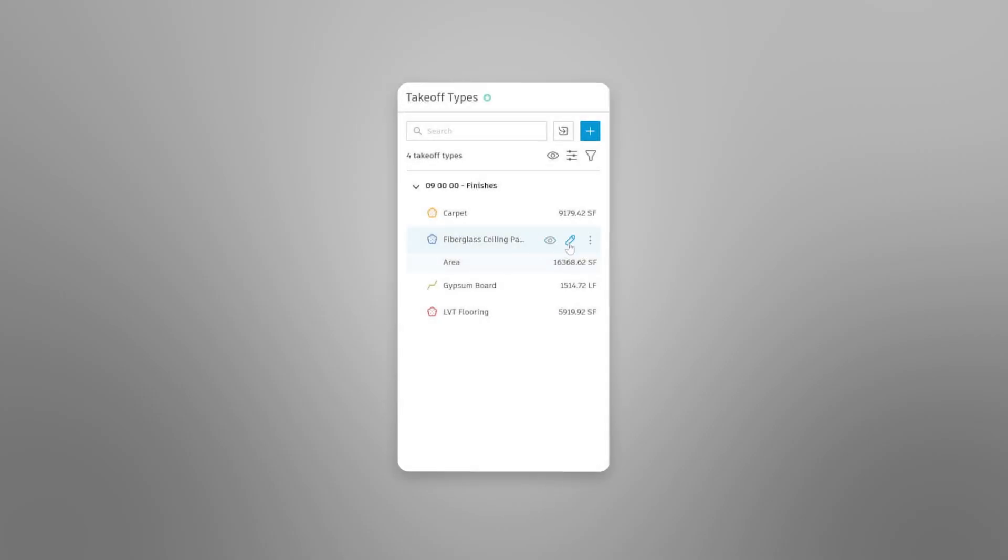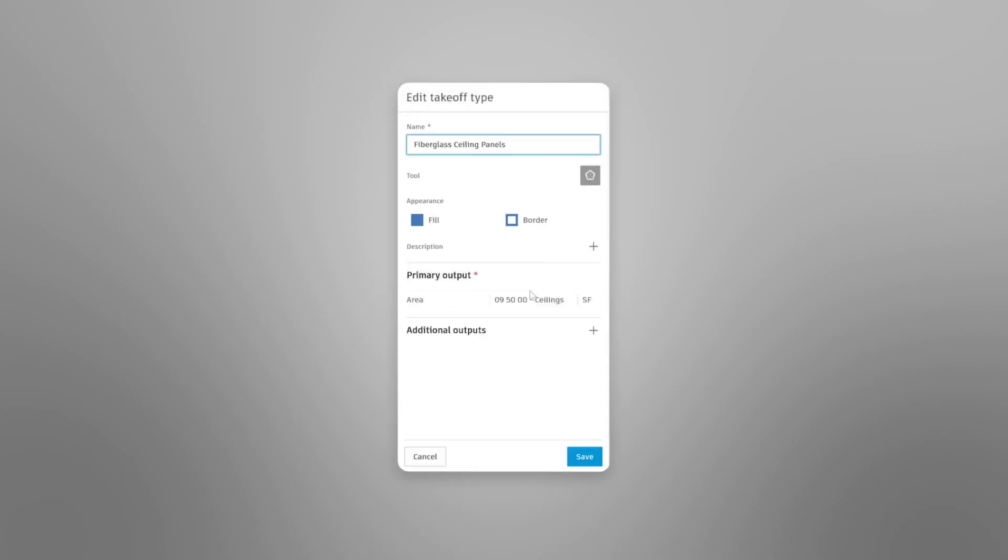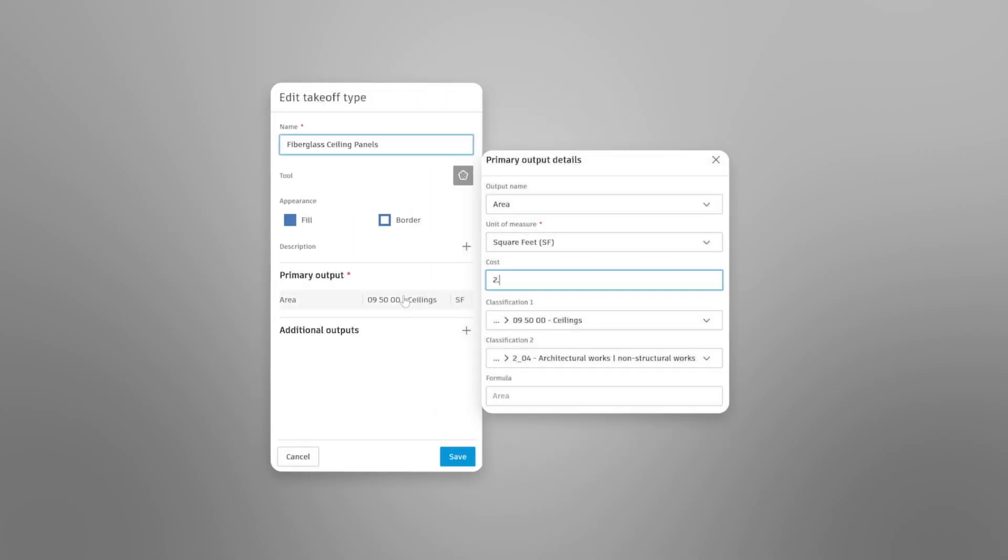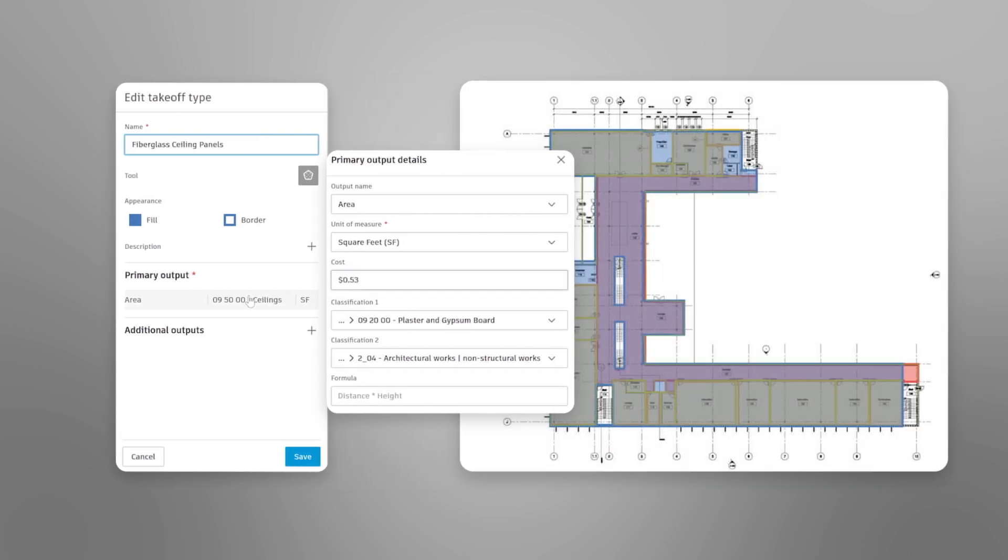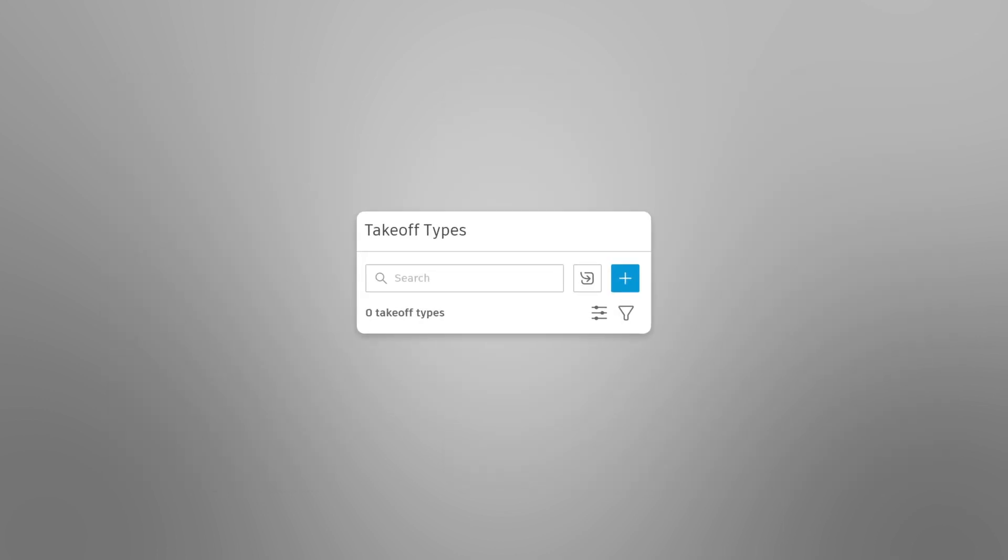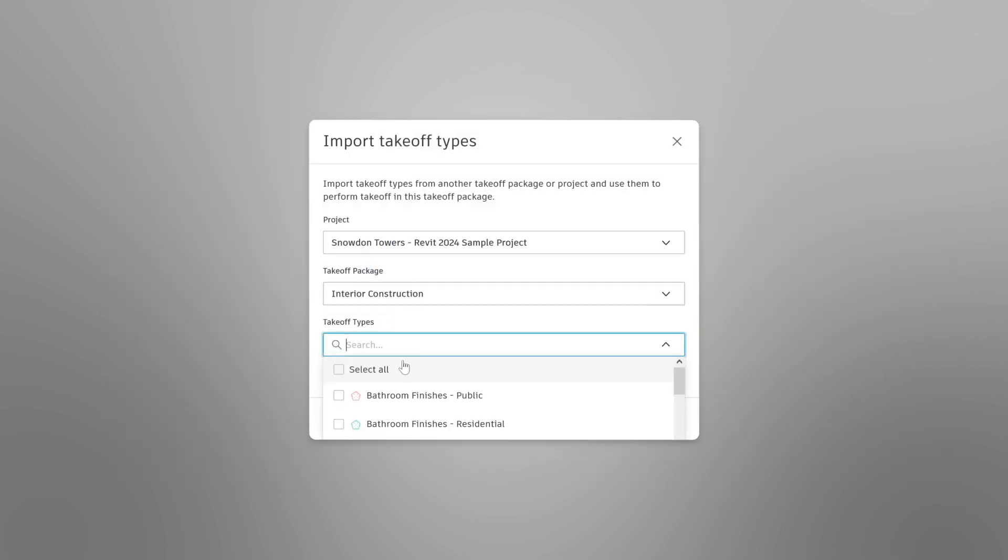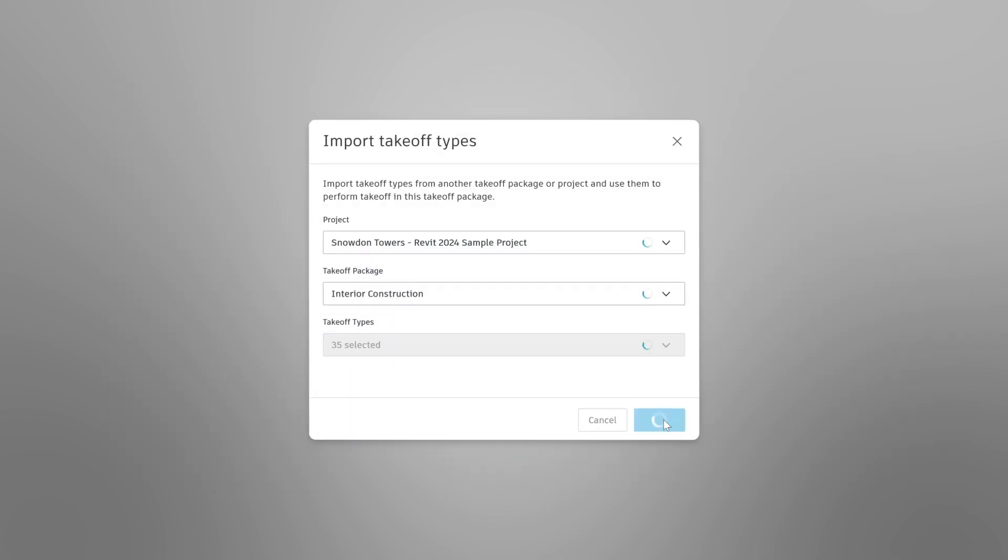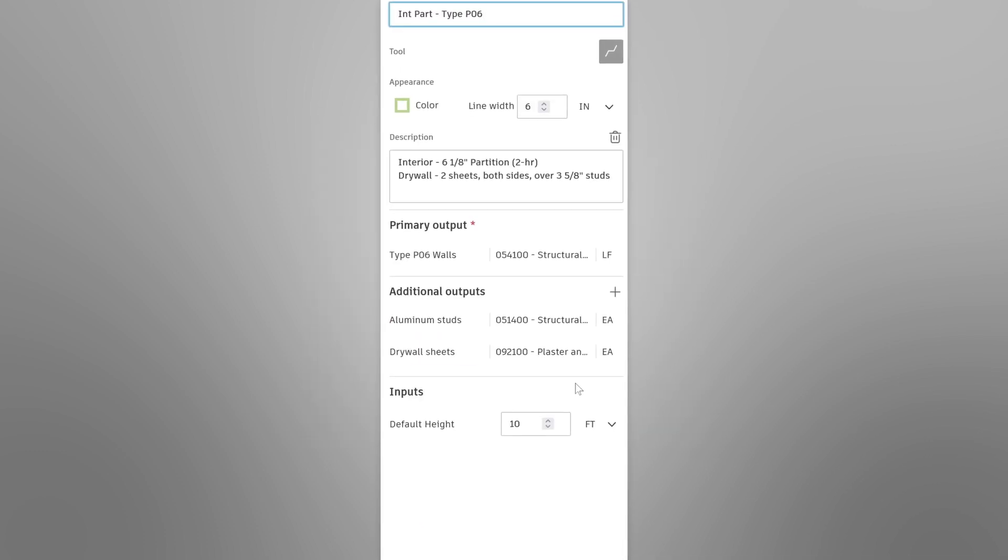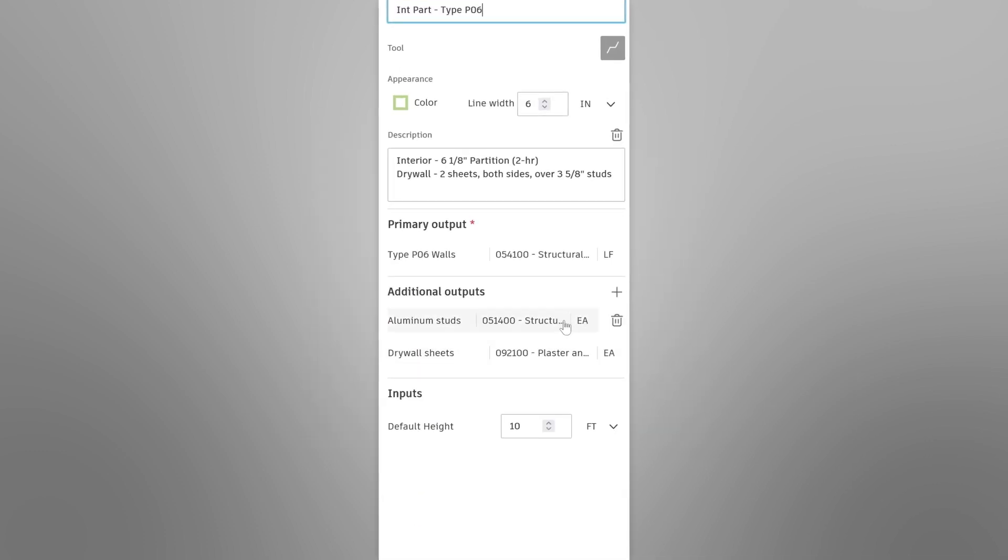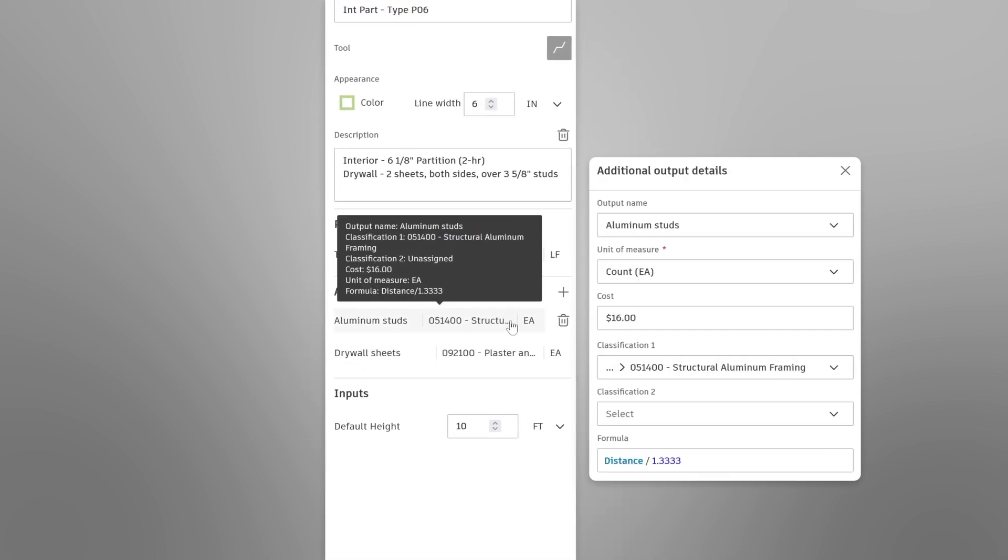With unit cost in Autodesk Takeoff, estimators can easily calculate rough estimates that update as quantities change while performing 2D and 3D takeoff. And unit costs carry over through takeoff type imports, allowing teams and companies to use costs from previous projects and create company-wide standards.